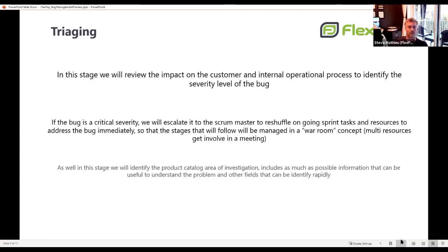So what is the triage for us? When a bug is reported, you don't know where it's coming from or what it means. Maybe it's a new feature, maybe it's a real bug, maybe it's critical. We need to process fast to figure out if this is a real problem where I have to stop someone and get it fixed. Identify fast if it's something critical that I need to put someone on. Because if it's a normal bug that can wait, we just log it and don't do much more on it.